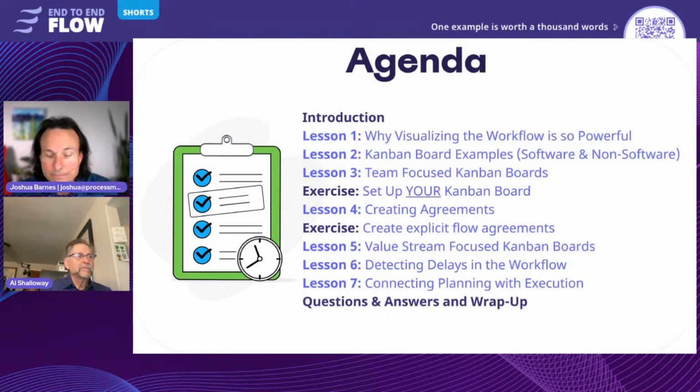But there's another cost of delay, the impact of delay, maybe you call it, which is when you get feedback late. Then if you've been doing the wrong thing because of a misunderstanding, you end up doing work you didn't need to be doing. This is really what waste is in lean. A lot of times people debate whether planning is waste. No, what's really waste is working on something you shouldn't have because of a delay in feedback. So this is really important.